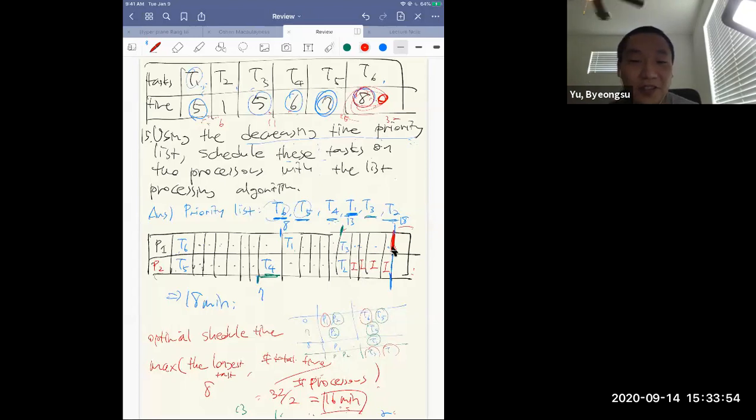It is not a mathematical law, but if the completion times for each task are similar to each other, then the second case is the optimal schedule. If they vary very broadly, then the first one is the optimal one. So it depends on the completion times, right?